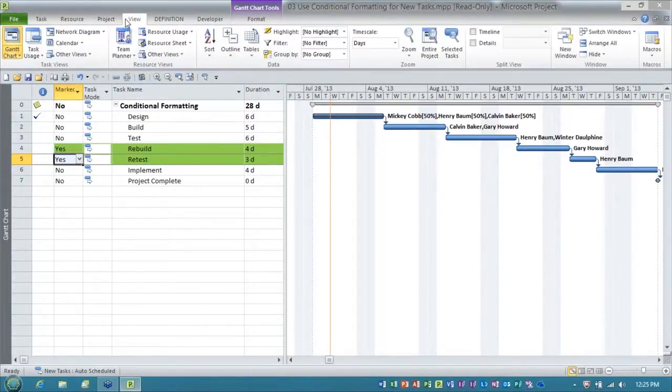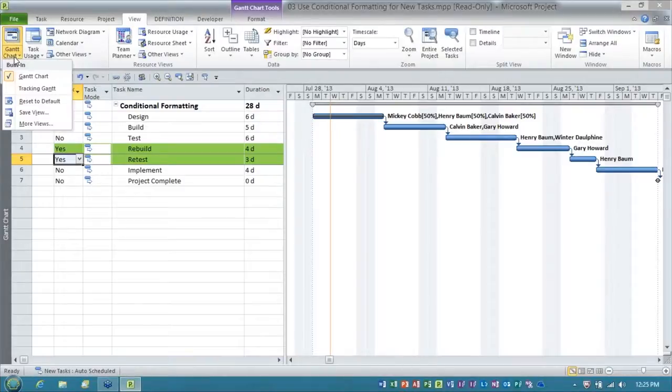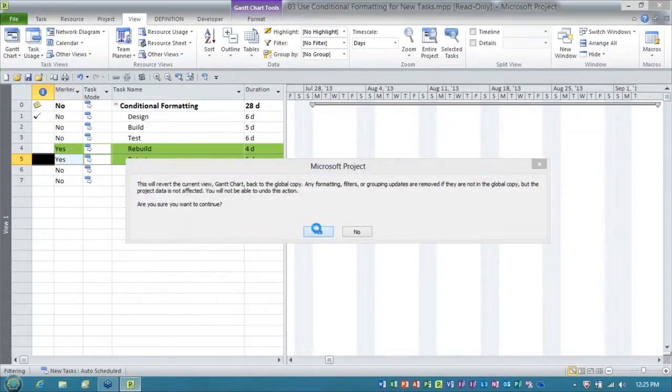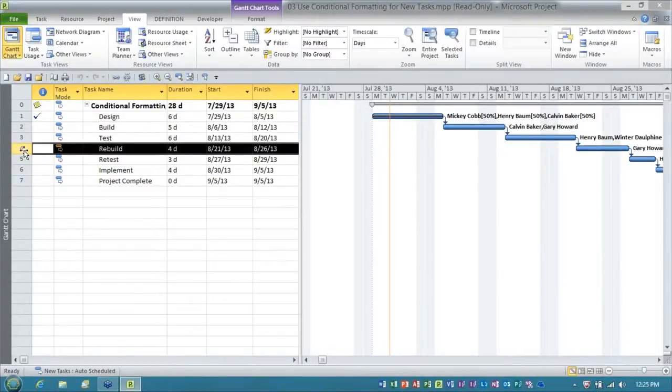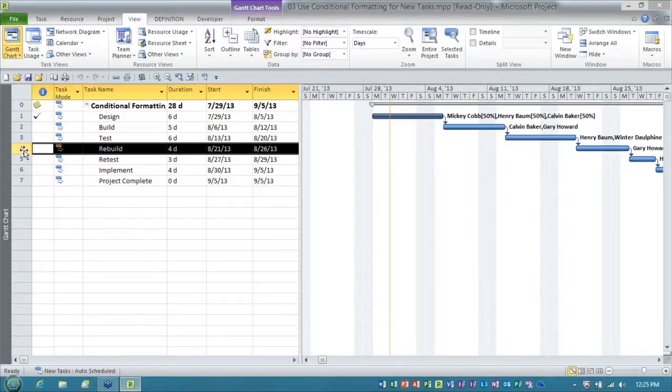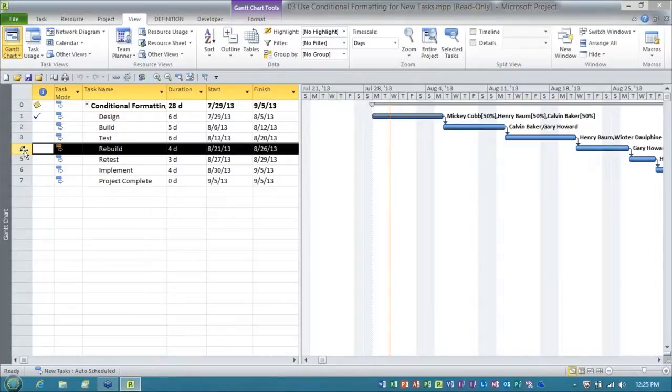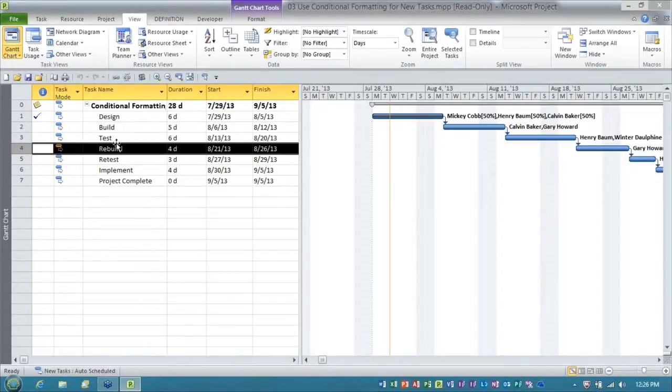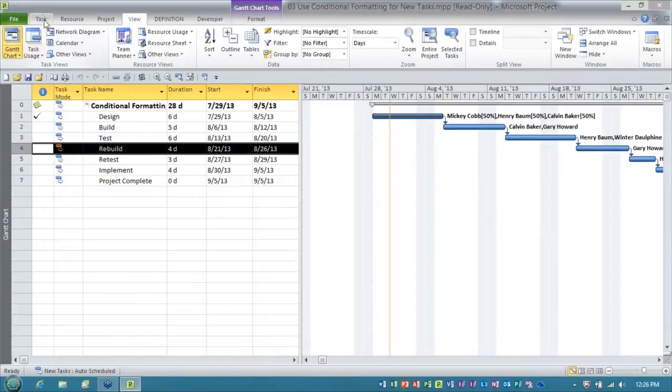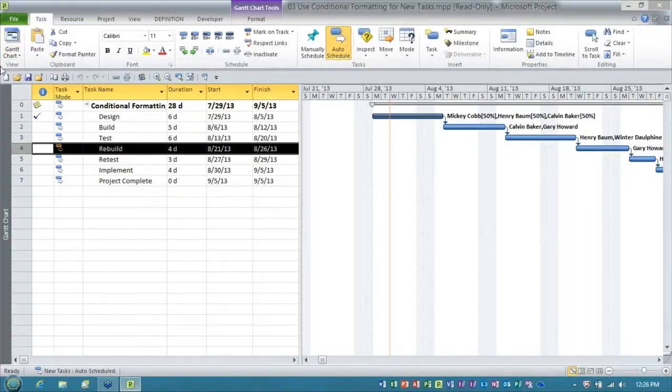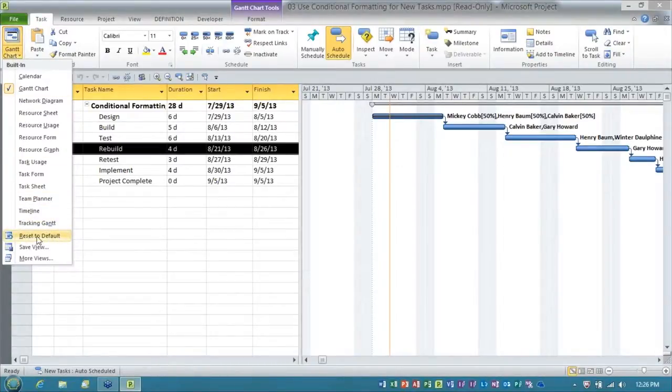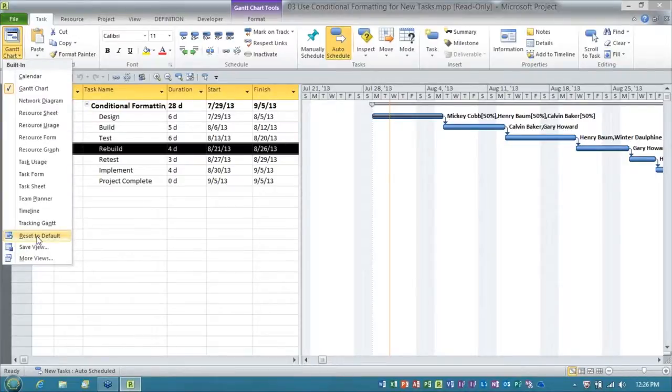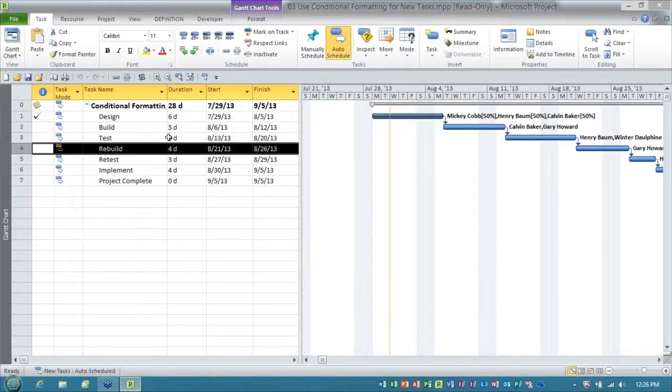Let me, that's a question nobody's ever asked me. Let me try doing something here and I'll tell you what the answer is. Aha! That's exactly what I thought. Whenever you do either manual formatting of cell background colors or you use the conditional formatting, that becomes an attribute of the view in which you apply it. Now, in my case, this is the Gantt chart view. So, what I did to go back to the default is on any of the view pick lists, for example, on the task ribbon, down near the bottom, you have an option called reset to default. And when you choose reset to default, it does put the Gantt chart view back in its original condition.